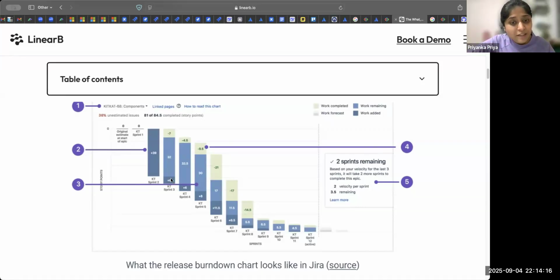So that is what I'm asking. 39 is your total story points for including all 12 sprints. Yes, these are the 39 points which we have to do in all these 12 sprints. So these 39 points, the story points which we assign, we generally do for a few features, right? We don't do it for the full release in one go. That is why we did not do it in one go.